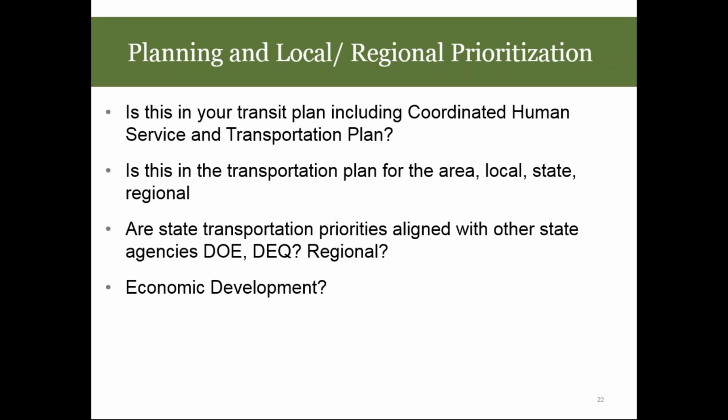Sure, happy to. Mountain Rides is in a rural area without an MPO. The planning that incorporated this transition to battery electric was largely local planning, inclusion in budgeting, and also in Mountain Rides' 5-year transit development plan.